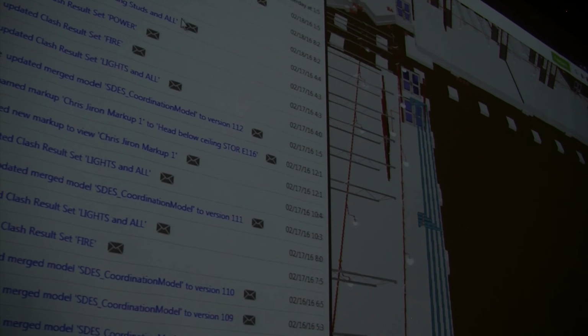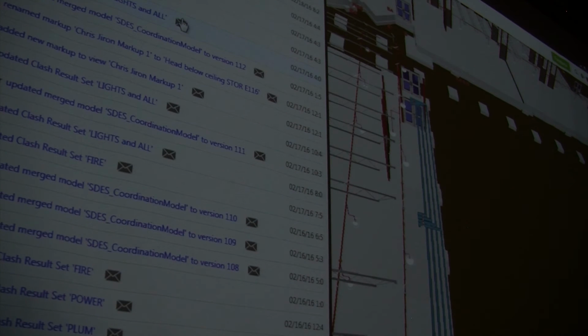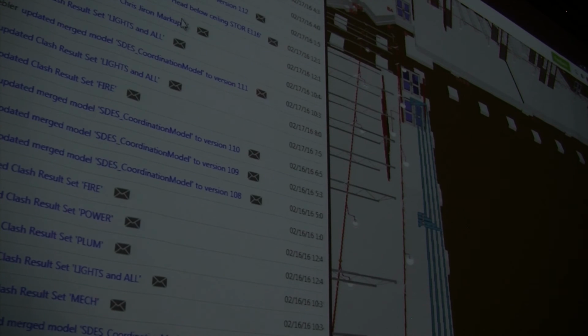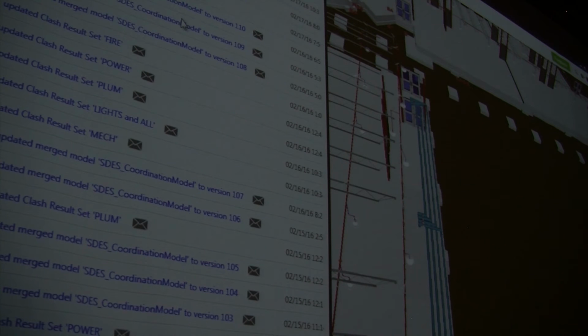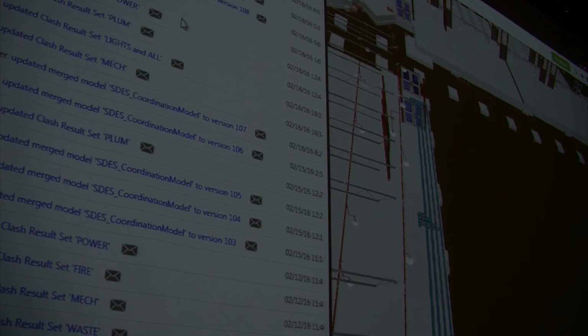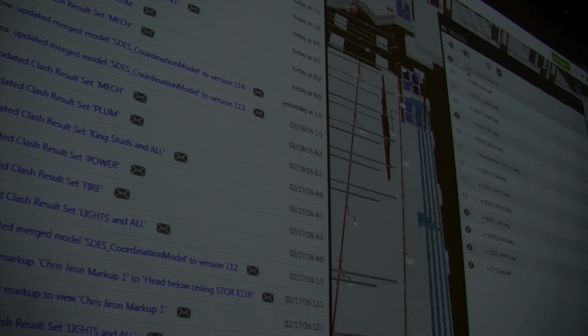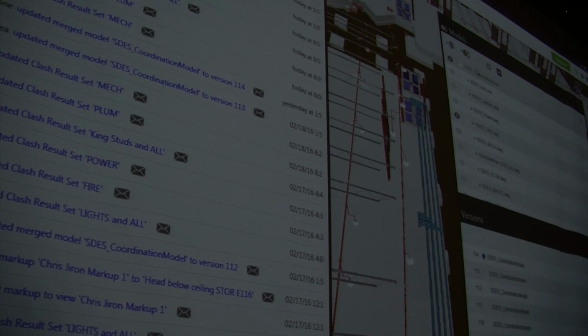You know, collaboration is something that we're all striving towards. Integrated project delivery is going to be the next future of project delivery. In New Mexico, we don't have the legislation to allow it yet. But in that scenario, we're all going to work together. And the interesting thing is all of our margins are going to be tied together. So if the project is a success, everybody's successful. If the project's a failure, everybody fails. So we're being forced to collaborate more and more and more.